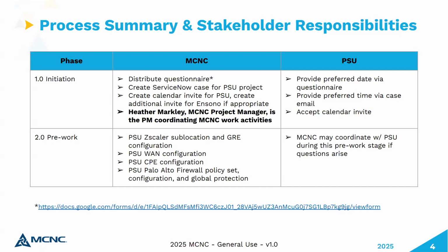And we will also be creating calendar invites for Insono. We'll talk about that more in a minute. But basically, if you are a production Insono PSU, we'll be doing that in a second maintenance window. This is a fairly complicated migration, and trying to coordinate the Insono work at the same time we're coordinating the GRE migration work, we just felt was going to complicate things a little too much, and we'd be better off creating a second window. But again, I'll talk more about that here in a minute.